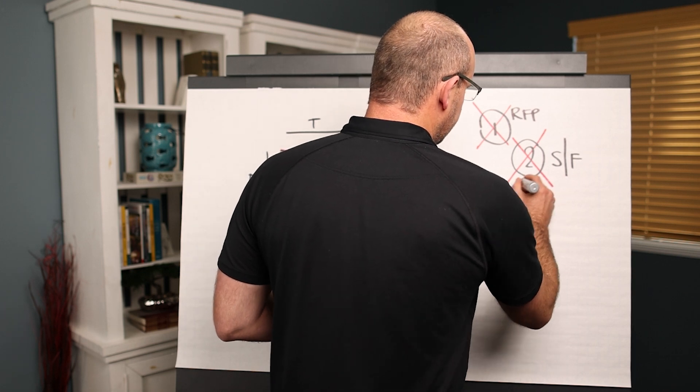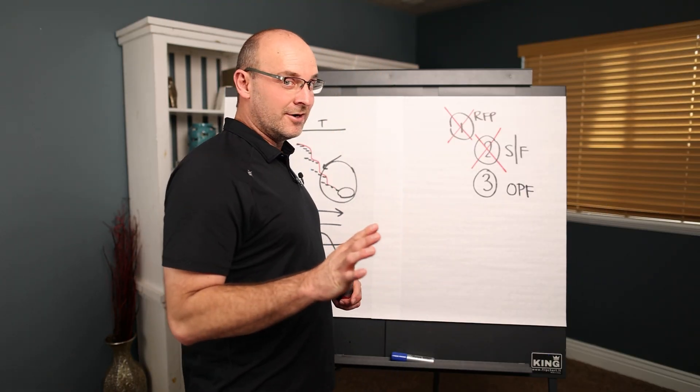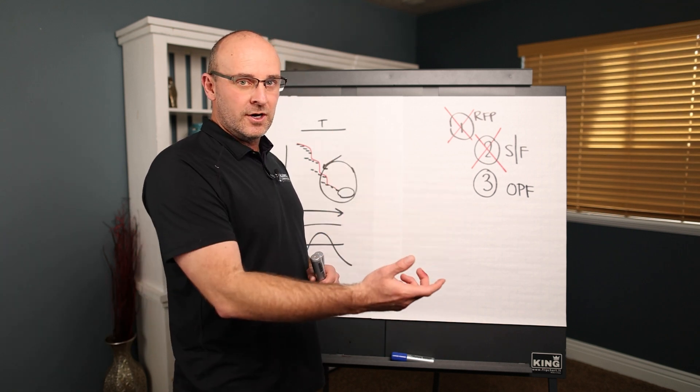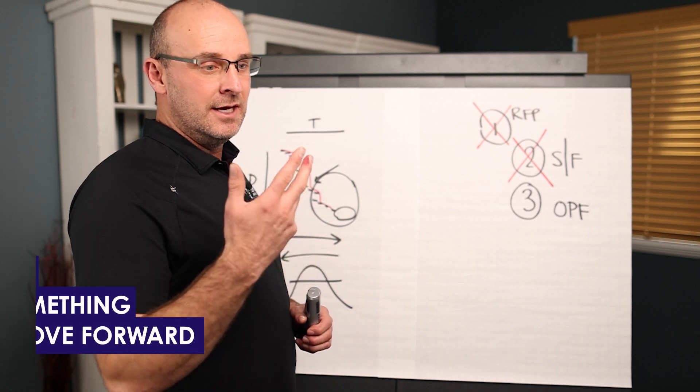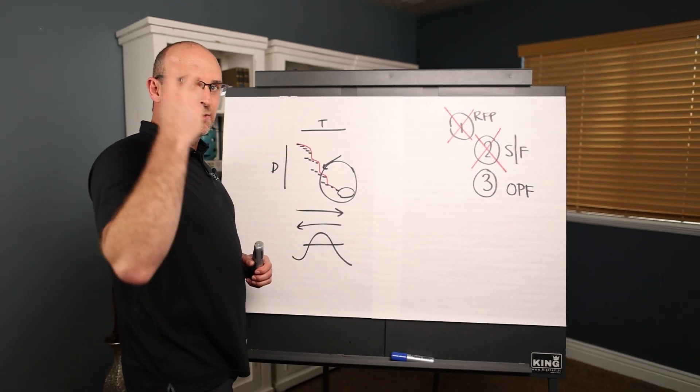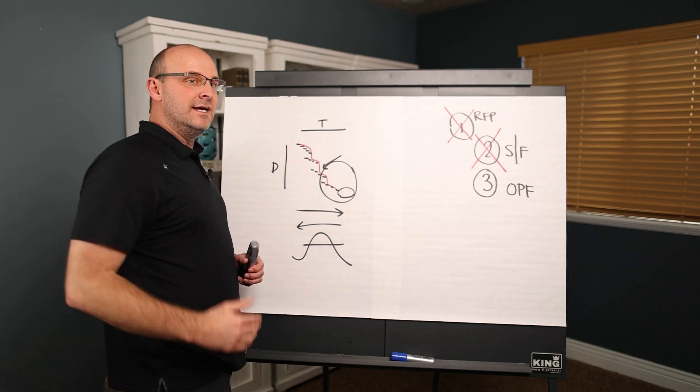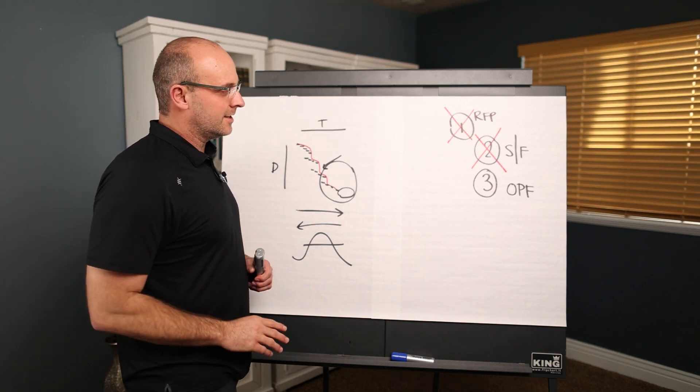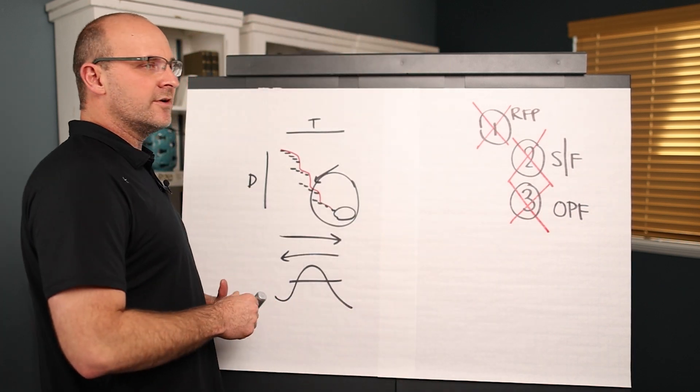Number three: lean thinking is all about one piece or one process flow, or I've actually invented a term which sounds really stupid or arrogant either way, but one progress flow. Whatever you want to call it, one piece flow is manufacturing, one process flow or one progress flow is construction. That's where you plan something, do something, finish something, then go on to the next something, whether it's a piece, a process, or the progress on your construction project. CPM does not allow you to do that because it's trade stacking, trade burdening, and it's making trades start too many things at once and never finishing. It does not have a trade flow, it does not crew tie. Even if they say they do, never seen it happen in hundreds and hundreds of schedules. CPM does not allow trades to work in one piece or one process flow, therefore is not lean.